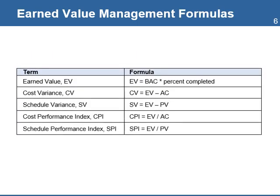To calculate the values of EVM, you can use the following formulas. Earned Value equals the total budget multiplied by the percentage of work completed at a specific time. Cost Variance equals Earned Value minus Actual Cost. Schedule Variance equals Earned Value minus Planned Value. The Cost Performance Index equals Earned Value divided by Actual Cost, and the Schedule Performance Index equals Earned Value divided by Planned Value.